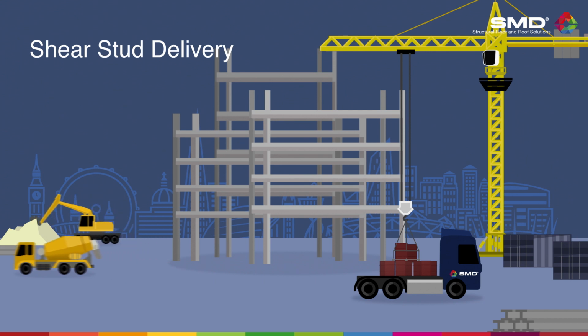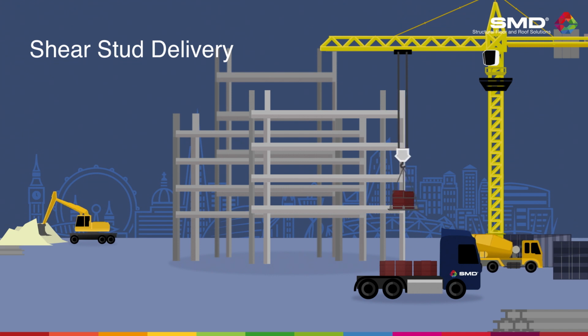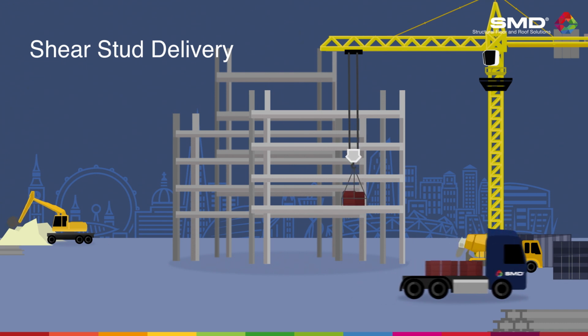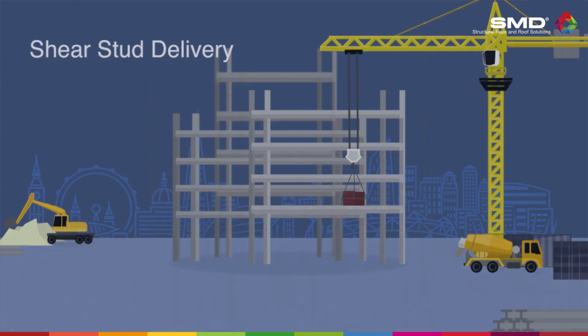If required, it's the responsibility of the client for shear studs to be lifted to level and positioned as requested by SMD's site installation team. Due to manual handling and health and safety issues, shear studs cannot be carried to level by hand.